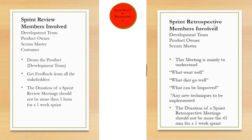Then there is the sprint retrospective. Members involved are the development team, the product owner, and the scrum master. This meeting is mainly to understand from the team members: what went well, what didn't go well in the sprint, what can be improved, and whether there are any techniques to be implemented. The duration of the sprint retrospective should not be more than 45 minutes for a one-week sprint.